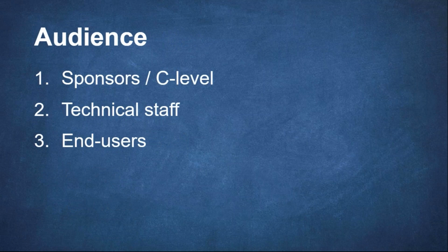So who do we talk to? I find that it helps to divide our interviews into 3 separate audiences. The sponsors give kind of the commander's intent, the overall goal and strategy. The technical staff helps us understand what they're licensed for, who they already talked to, and what they would prefer we didn't tell the users.